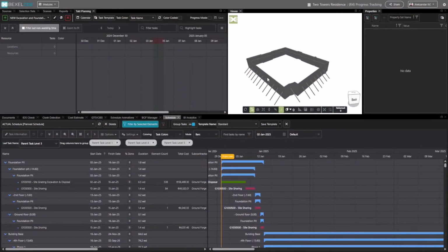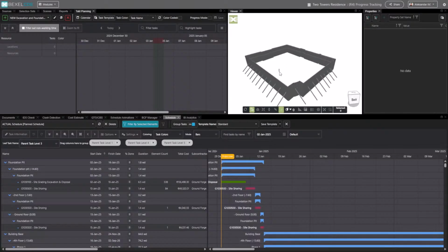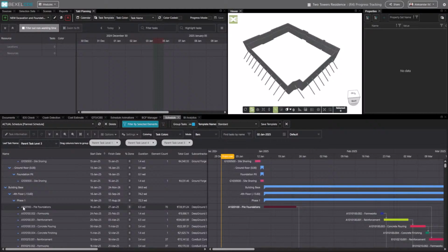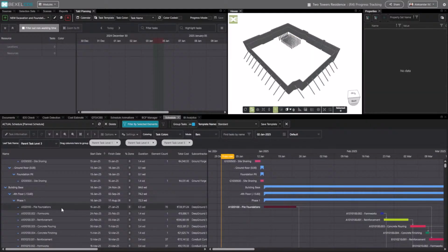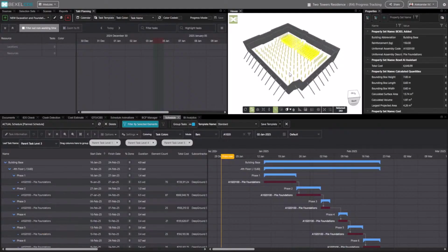So we're going to visualize, let's say, what is the excavation group of work that had to be added to this planning. So besides the excavation, we're also going to include the foundation pile tasks that are also relevant for us. As you can see, the idea here is to add just a handful of tasks that are the short-term tasks for the next 2 to 3 weeks tops, because we're going to update our canvases from time to time when our actual schedule is updated.